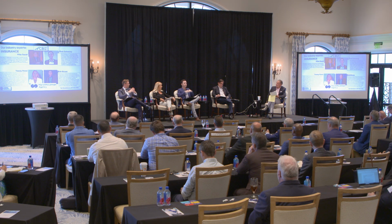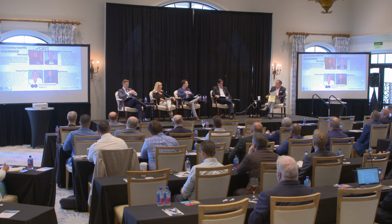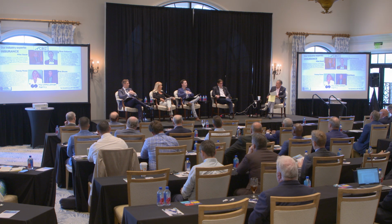Mike and I had a very large claim happen about 18 months ago where they were renovating the second floor, and there was a leak in the roof that trickled down all the way to the first floor. And so it really came into that event where there were 2 carriers on it. Fortunately, it was Zurich, who Mike mentioned, and they have a sister company that does builder's risk. So it was all basically under the same umbrella, so it was a simple process to run through. But it was really important to have coverage that paired together versus separately.